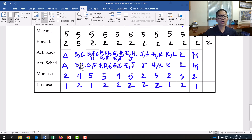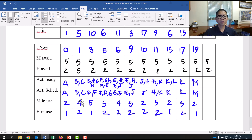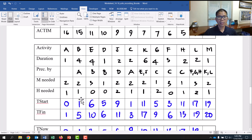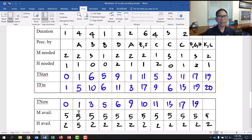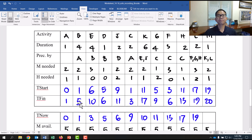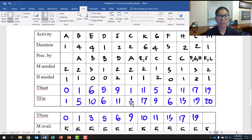Time now is 1. Schedule B and C together, recording mason-in-use as 4 and helper-in-use as 2. For column B: time start = 1, plus duration 4, so time finish = 5. For column C: time start = 1, plus duration 2, so time finish = 3. Between B's finish of 5 and C's finish of 3, take the minimum: move to time now = 3.